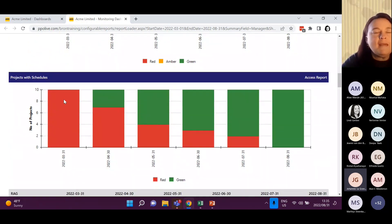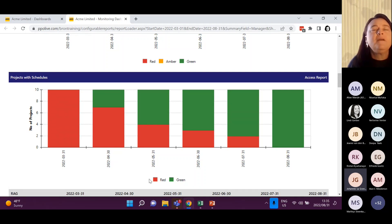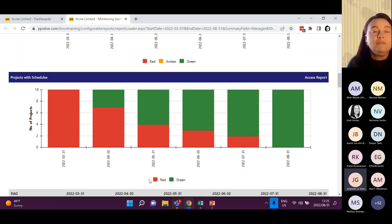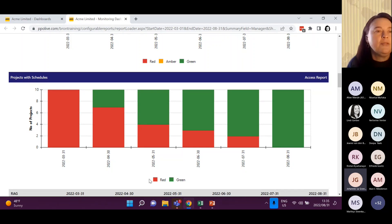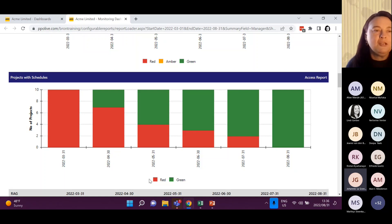If you remember that little RAG on the project - 'projects with a schedule' - has a schedule been imported? This story starts at a big mining company where our implementation was happening at the same time as a huge program. We had a lot of project managers who weren't actually project managers - they were stream leads, business people. Getting someone in that position to grips with Microsoft Project and then a project management tool is a challenge. So to track that they were getting their schedules into PPO, we put in this indicator to say: is there a schedule on the project or not? This is not about using a stick - it's about identifying who needs a little bit of help and facilitation.